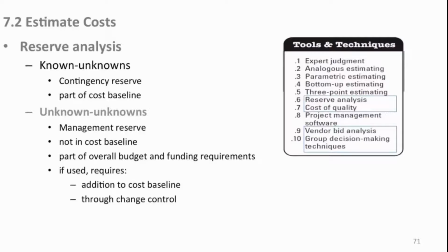Now as time goes on and you're managing your risk register, and you can see that the propensity for risks, the volume of risks, and the danger involved diminish over time with your project, you can release those management funds piece by piece, perhaps back to the company, and they'll appreciate that a great deal. So in the end, theoretically, you'll have no management funds left. You didn't use them. Not in the cost baseline, not in the budget. Remember, cost baseline equals budget, approved budget.